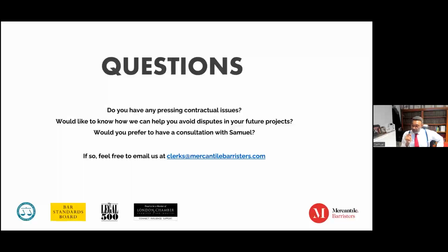Clearly, if it is worth the risk, it follows that you must substantially overprice for the time being in order to secure the contract. The likelihood is that you won't secure the contract if you overprice. So what you want to do is suggest a clause to the principal contractor that must go into your own subcontract. And that is a fluctuation clause, which they are lacking. And indeed, a sensible main contractor in these circumstances ought to return to the employer to say, look, circumstances have changed. Can we talk?